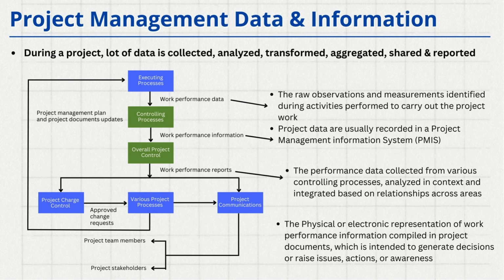Anyway, from there, we are going to move on to project management data and information. While working on the project, you will be gathering lots of data. You should have a strategy in place in terms of how you are going to deal with that data, what kind of information, what kind of metrics you should be preparing. Most of the time, I have seen that unless you are in a very small company, there is always some project management information system, PMIS, that is used, which could be something like the one you may already be using from Microsoft, MS Project, or it could be from CA Technologies, Clarity. Or it could simply be an Excel-based PMIS tool.